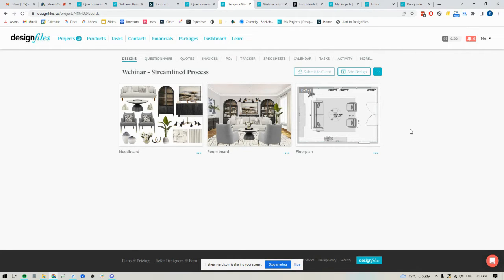All right. So once you have your timer in place, one of the next things, if you've already got your contract signed and you've got payment, you had the questionnaire filled out, you've set up your task list, you might be tempted to just immediately start jumping into sourcing products and creating design boards. But I would actually recommend that you pump the brakes on that just for a little bit, because I think that one of the best ways to kickstart any project, no matter what, is to start first with your floor plans before you get into creating your mood board designs.